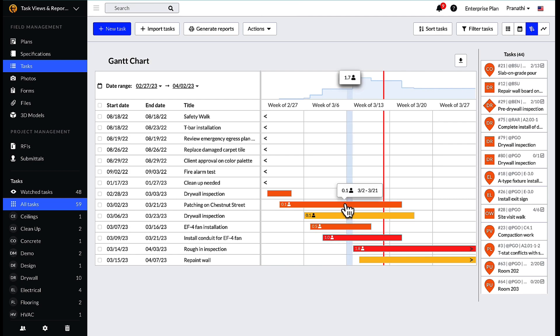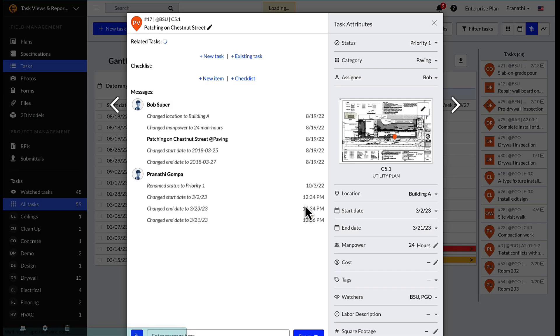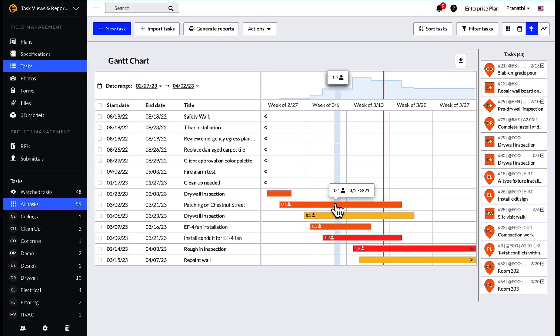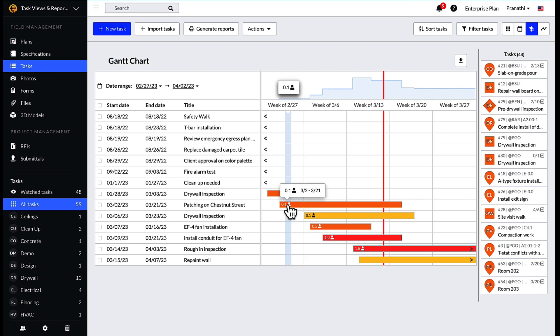In addition, if a task has the manpower attribute filled out, a number will display next to the task bar, indicating the number of workers needed to accomplish the task during the time specified.